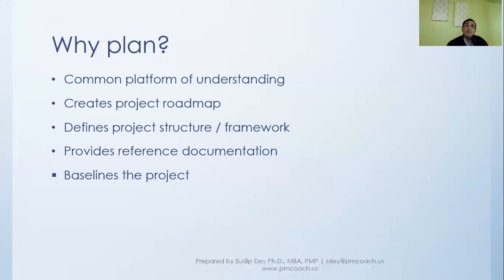So for example, if someone wants to find out whether we have exceeded the budget, it will be the cost baseline they'll refer to, because that is the baseline we set when we planned it. And when a baseline has to be changed, it has to go through a formal change control process and approval process before the baseline is changed. Because all the time we will compare the performance of the project with respect to the baseline.